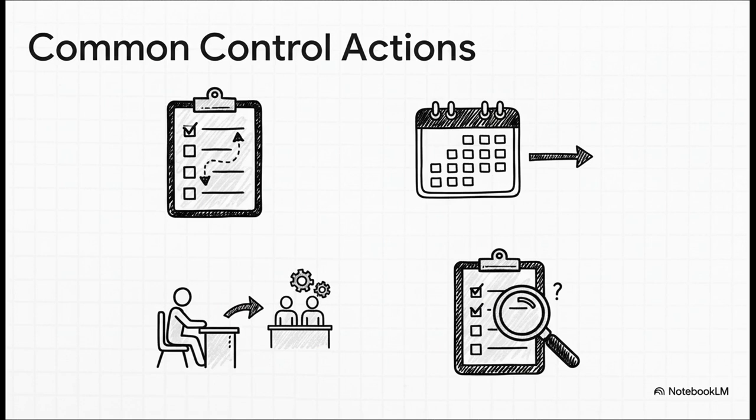And what do these actions look like? Well, the syllabus gives some great practical examples. Maybe a really important feature is way buggier than you thought, so you reprioritize your tests to focus there. Or maybe you're just plain behind schedule, so you adjust the timeline or bring in another tester. These are real, tangible things you can do to steer the project back on track.